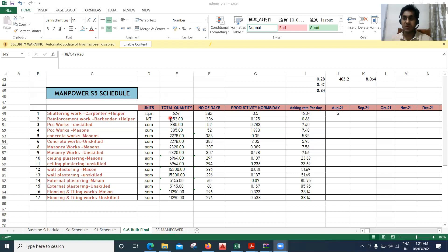We need to prepare each and every schedule. Now coming to the manpower, first we need to understand all these things. For shuttering work I require a carpenter and a helper — one carpenter and one helper. Similarly for reinforcement work I require one barbender and one helper. For PCC work, we differentiate in terms of unskilled laborers and also masons. Similarly for concreting work, we differentiate between masons and unskilled laborers.